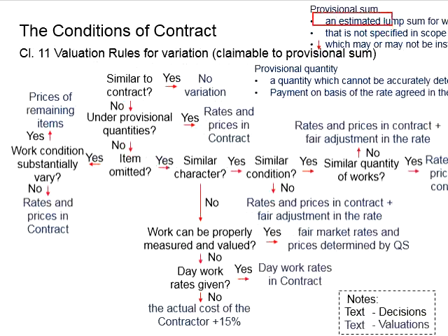First, what is the provisional sum? This is a sum which has already been calculated in the work, knowing the possibility of its existence within the scope, just that the relevant scope is not clearly specified. As the scope is not clearly specified, or due to lacking of the details, the quantities and the cost related to that particular work cannot be properly quantified.